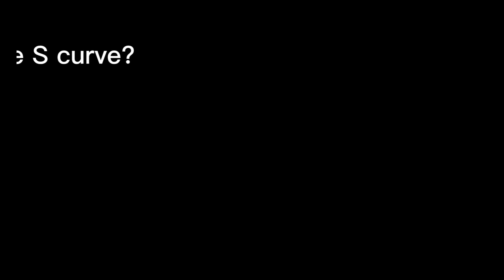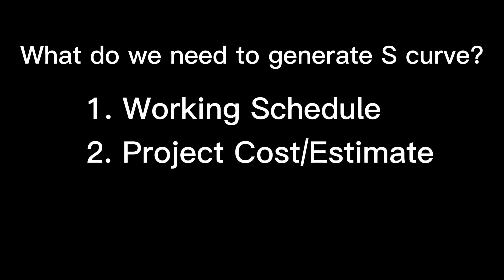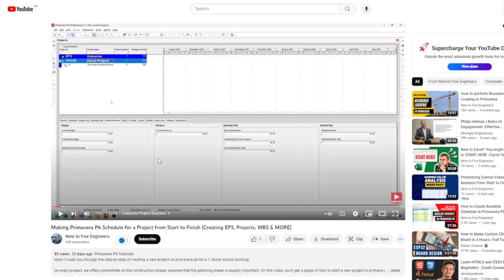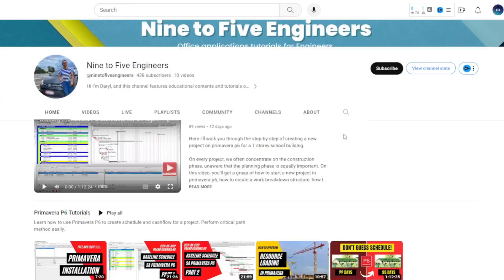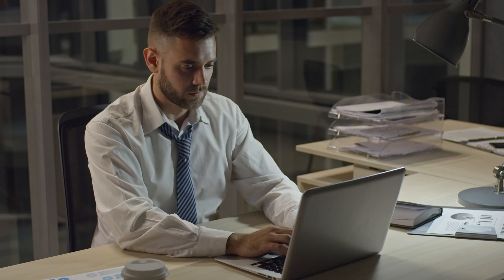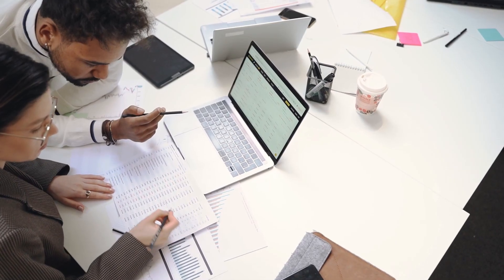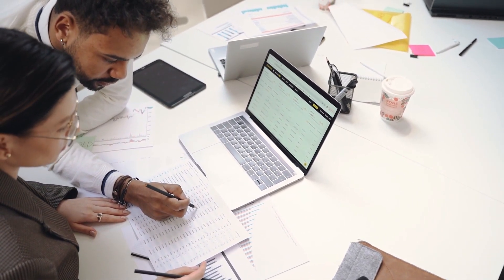As a summary, we need the following to generate the S-curve: number one is the working schedule, and number two is the cost from the BOQ. We incorporate the cost to the activities by cost loading. We can cost load the project by resource assignment or by expenses. If you like this video, I'd like to hear from you in the comments. Check out my other videos in Project Planning, Excel Tutorial, and Primavera Tutorial. Now that you know how to perform cost loading in the schedule, you can now perform earned value analysis when you update it. If you want to learn more about the earned value analysis, you can watch this video. Thank you.